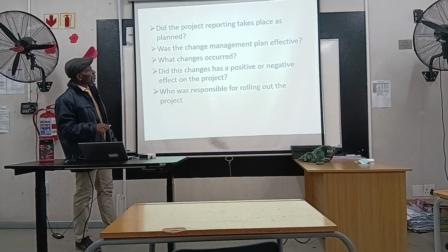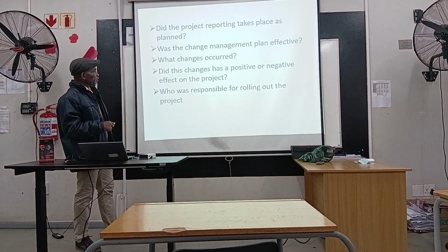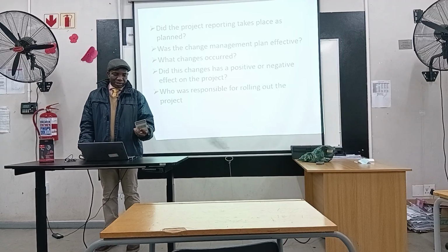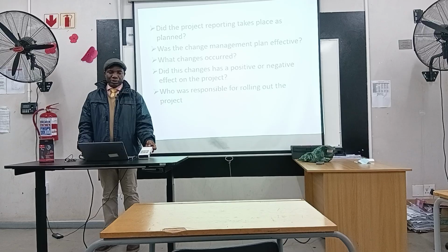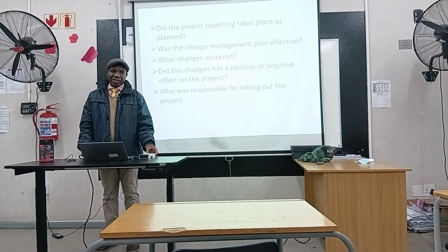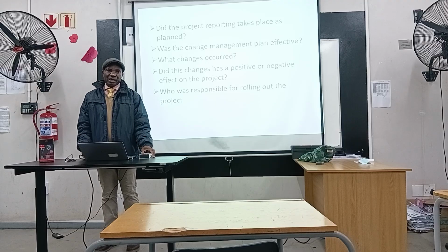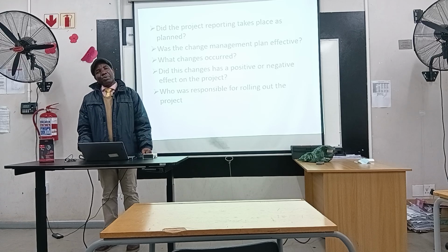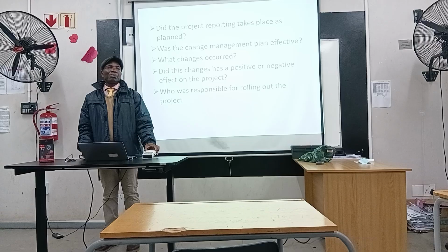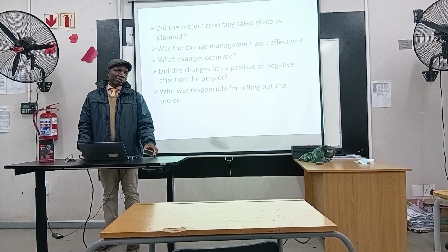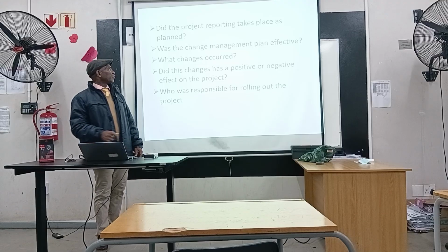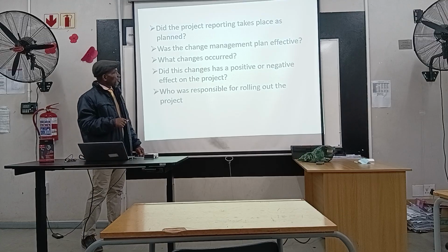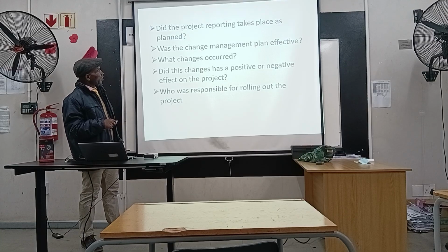Then, was the change management plan effective? Change management. Remember, a project has a scope, right? The scope of the project needs to be adhered to, because the project scope details out what needs to be done. So any attempt to go beyond the project scope can compromise the quality of the project, or the budget, or the timeline or duration of the project. So, like we've discussed in the previous lessons, one needs to be able to manage the scope of the project.